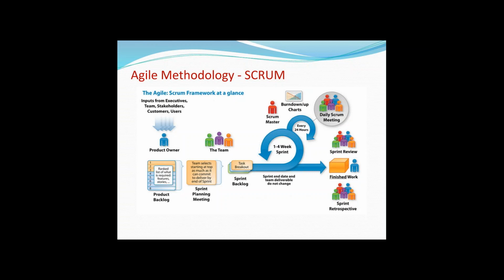And if 6 days are allocated for a developer, and they work on average 6 hours a day, that means 36 hours is what they estimate, asking what task can be accomplished in these 36 hours. If you understand the concept, in the previous scenario we understood that in agile, if I have a registration page where I need to add some registration details and save them into the database, and that cannot be done in 36 hours, I will break down the task into smaller pieces.